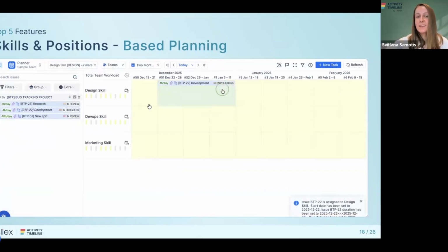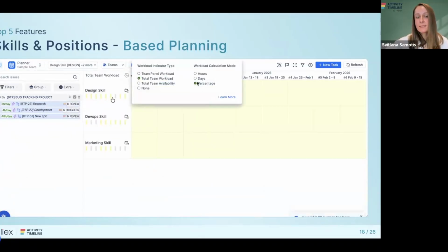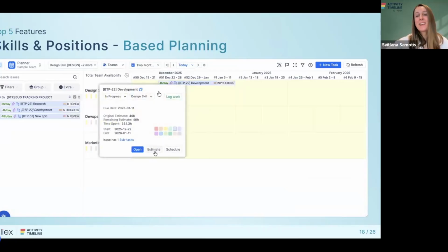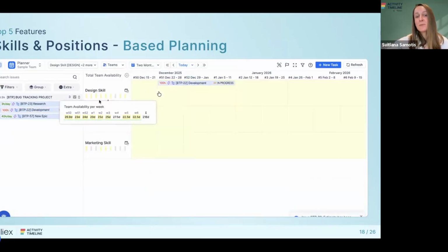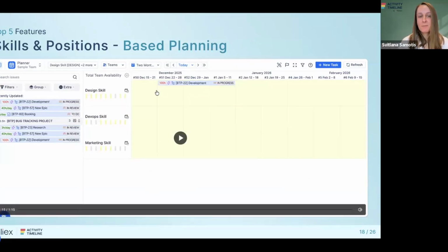And I can go ahead and assign those epics at the team level. So basically predict how my assignment will influence the team's capacity. In this case, it's in hours a day format, but let's say if you have a 100 hours epic, will your team be able to manage it as a whole? This is more like high-level resource planning. And then maybe the resource manager will go ahead and distribute this epic across each of the users inside of the team, like this.